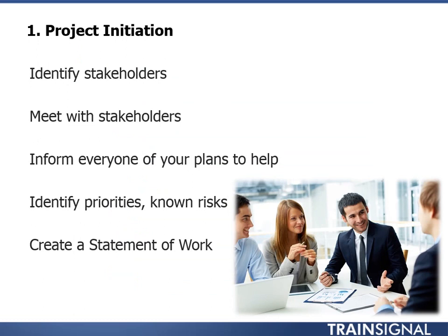During the project initiation, well, it's a meeting, though you'll probably precede it with various emails and other types of messages. You identify the stakeholders, and the word stakeholder just means anybody who has a say in a particular resource or asset in your organization. So it's going to be managers and network administrators. If you have special systems for the accounting department, well, the accounting manager probably wants to be there. So you figure out who all these managers are, and that usually involves contacting the higher-ups in the organization and having them delegate the responsibility down to the lower people.